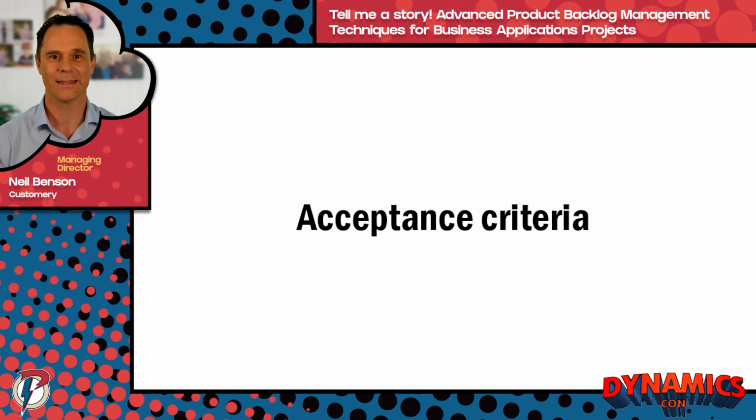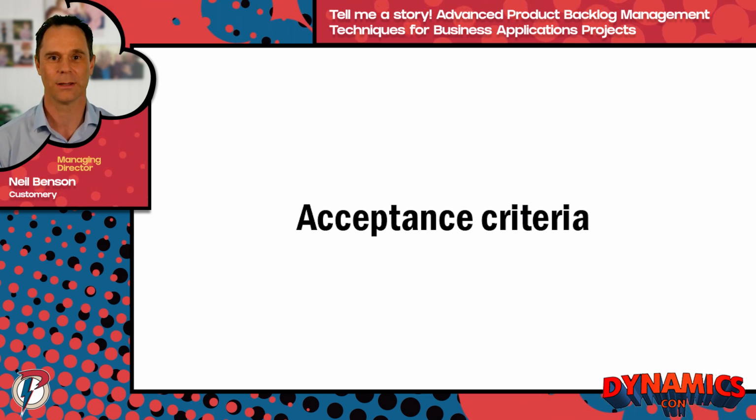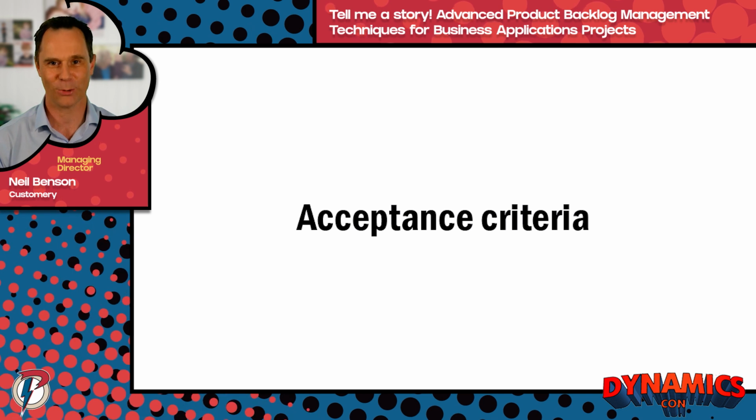Acceptance criteria capture the detail of the story and remind us of the conversations that the developers have had with the users. They signal when the story will be finished. When all the tests are met, the product owner should be able to accept the story as done. Acceptance criteria also helps the testers in our team write fully fledged acceptance tests.